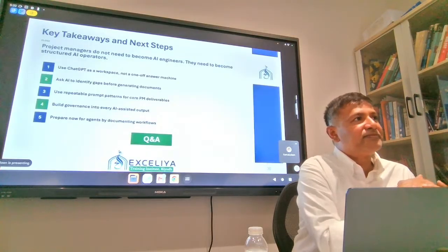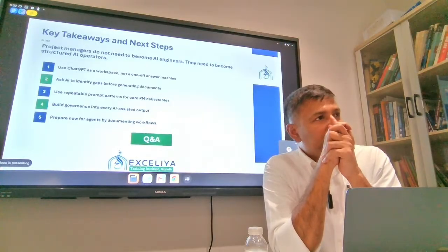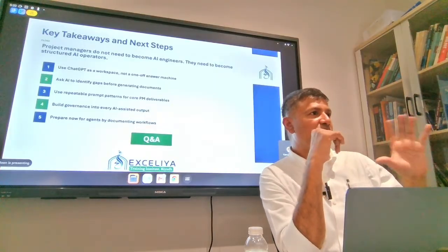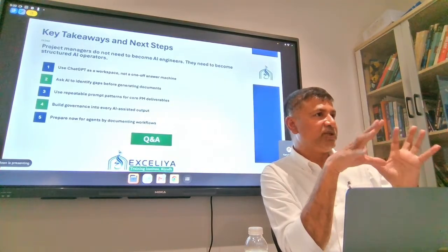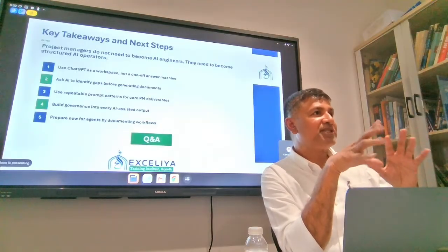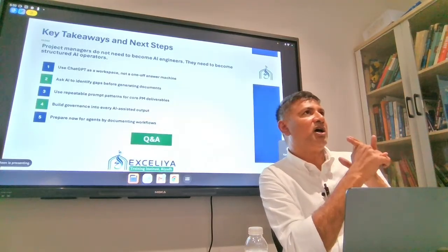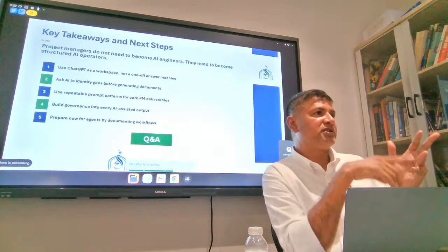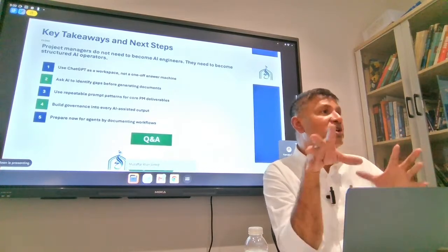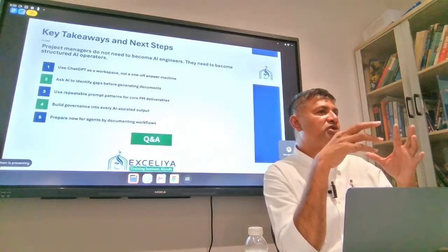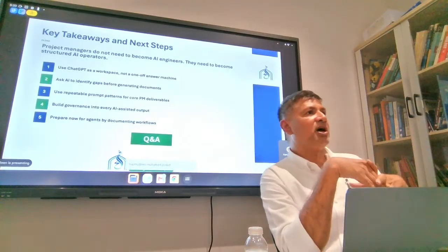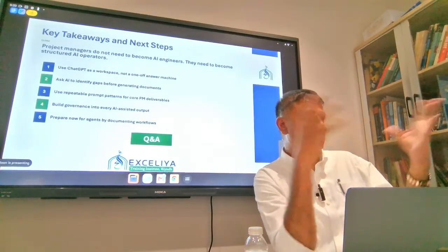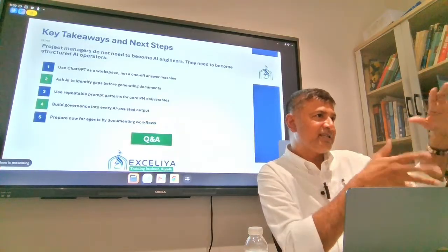How about risk management, the case-by-case analysis related to GPT cases, or would it be in the project? See, for example, you create a risk analyst GPT. You give it a set of instructions. Let's say I want each risk to be categorized, prioritized, with impact and severity. You give a template for it. And if it is very big, provide me an Ishikawa diagram, a fishbone diagram, to assess the risk and see the high-level picture. Now you create this as a GPT.